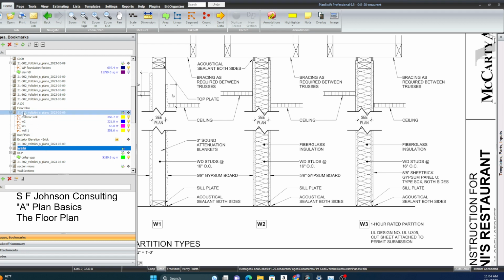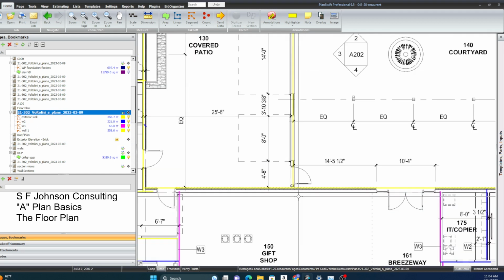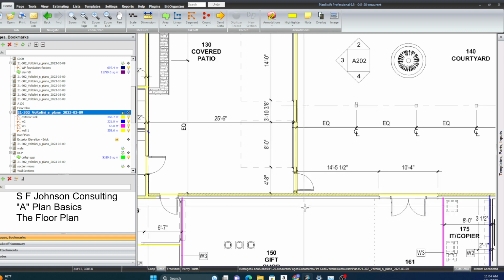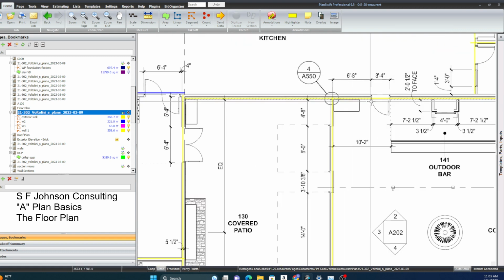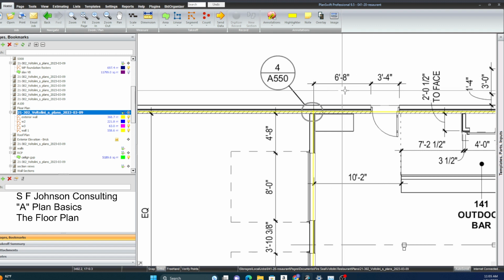So okay, let's go back to that. And we can determine from that, because it should tell us that width. The dimension plan gives you measurements, right? So here are measurements from hash mark to hash mark. That's the length. Because this length and this length of wall are parallel, and when you have two parallel lines and you have the length of one, you can assume that is the length of the other. So that's how we do that one.